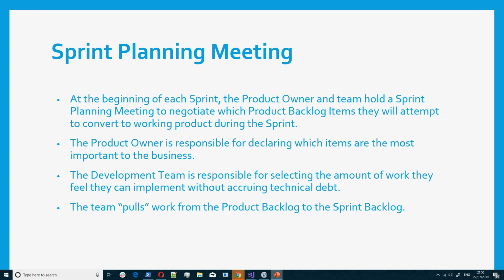And you know your sprints have got a limited time. Let's assume your sprint is only 14 days. So you only pull work that can be delivered within that 14 days, which could be 2 weeks. So you have basically 10 days to work on those items that you put into it.